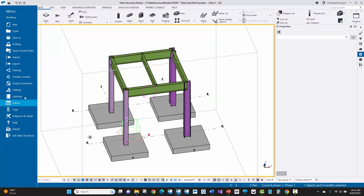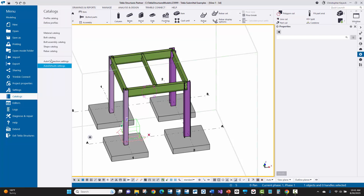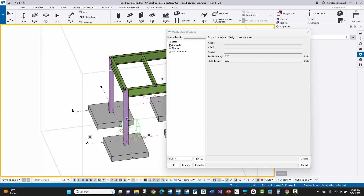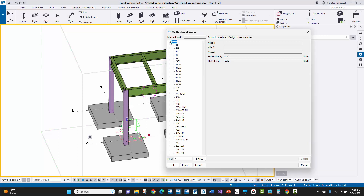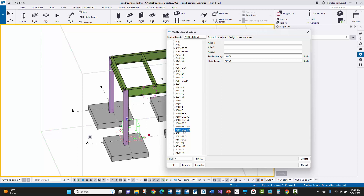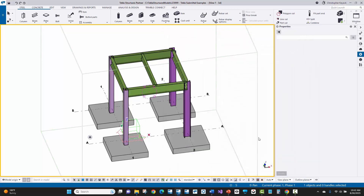This is usually controlled under the Tekla menu under Catalogs, where you have the profile catalog, bolt catalog, and material catalog. The material catalog is usually where a lot of issues are related to material grades. On any steel, you can come in here — one of the big culprits is A500 Grade C or Grade B. Sometimes fabricators want this shortened or formatted a little differently. So you can always copy that grade, change it to whatever they want, make sure you input those into the properties, and coordinate that upfront at the beginning of the job.